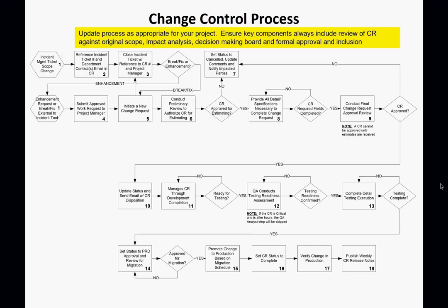Now, what you're doing is you're taking all the changes that you have analyzed. So say we've analyzed this, we've analyzed that. Do you want to approve this change or you don't want to approve the change? So the Change Control Board will look through all the changes and say, okay, yes, that change is acceptable, yes, we requested for that, yes, we approve that, yes, we have money for that, yes, we have time for that, and all that. So after that, they will either do two things: approve or reject.